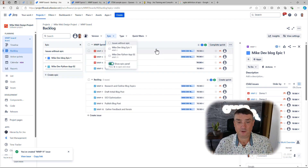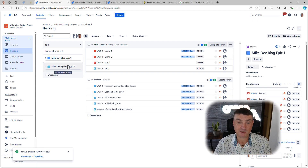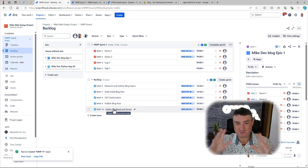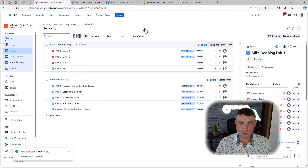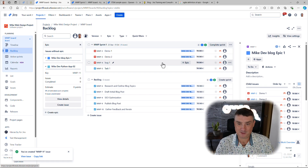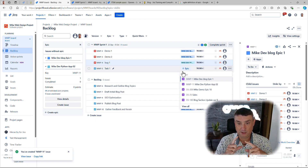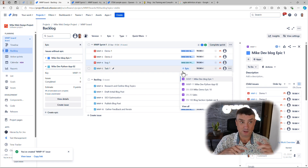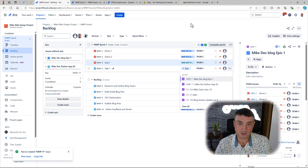The reason epics don't show in the backlog is that there's no point showing a large task that will take two or three sprints in the regular backlog view. That said, you can adjust the board filter if you need them visible there. To associate issues with an epic, you can drag and drop from the epic panel, or use the plus button. Importantly, you can link issues from different projects to a single epic — so if graphic design is a separate Jira project, you can still link those issues.